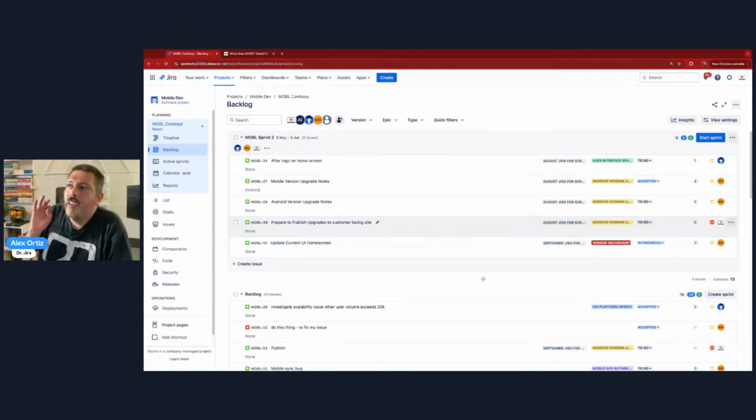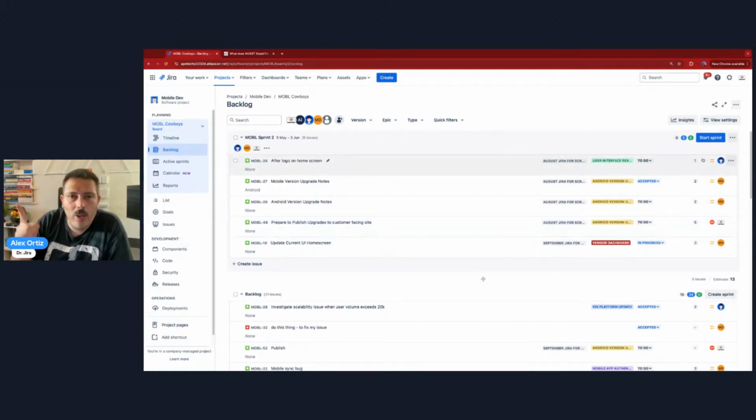But the most important thing, the thing I will tell you as a Scrum Master, what you should definitely lock down and have, without a shadow of a doubt, everybody should have the same. I'll repeat that. Everybody on your team, across your company if possible, your directors, vice presidents, the president, the CEO, your scrum masters, your product owners, your developers, everybody should have the same understanding of what does a 1 mean, what does a 2 mean, what does a 3 mean, 5, 8, 13, and so on. Because the numbers are irrelevant. It's the meaning behind those numbers that should be very consistent across your team.